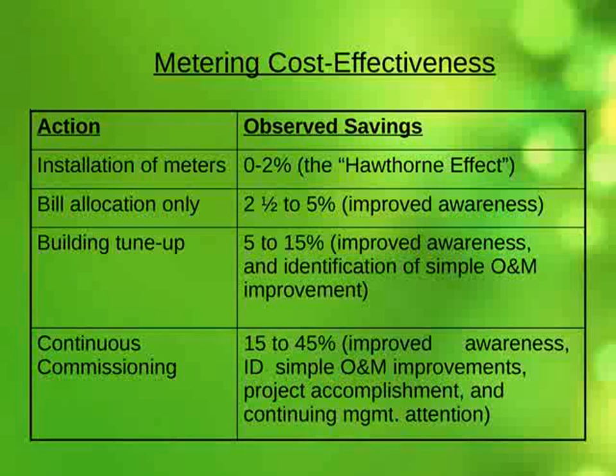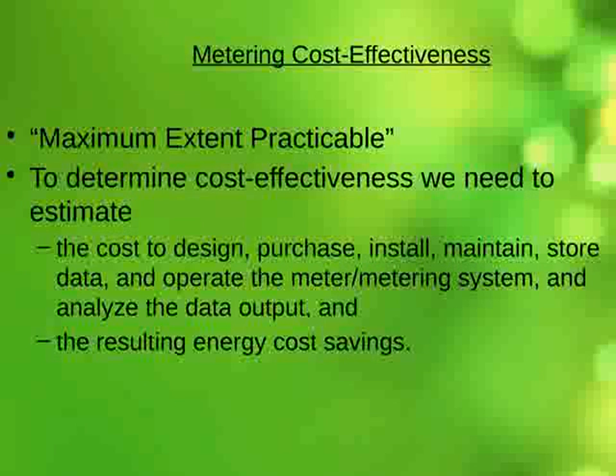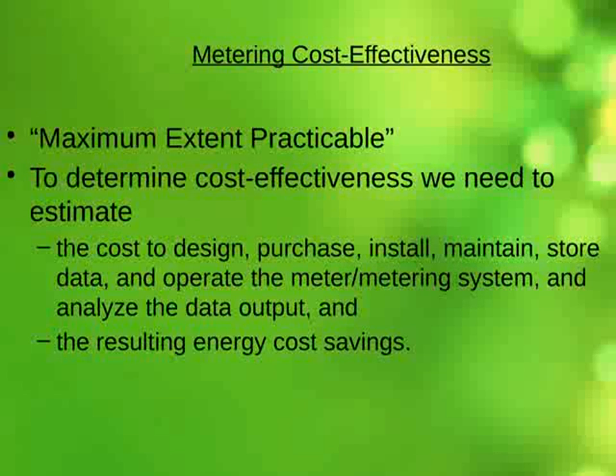So again, with that idea of continuous commissioning, you're looking at that maximal extent practical. And to determine the cost effectiveness, you need to look at the cost of the design, the purchase, the installation, the maintenance, the storage of all the data, and obviously the ongoing operation of the metering system.